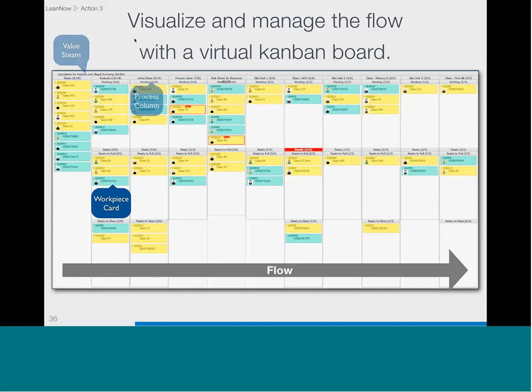There's a left to right flow to the board. There's a working area across the top of the board, and below that working area is an area called ready to pull, so that we know what can be pulled into the next area. So when work is complete, it's dropped down into the ready to pull area. There are other ways to do that on Kanban boards, but that's how this example works.